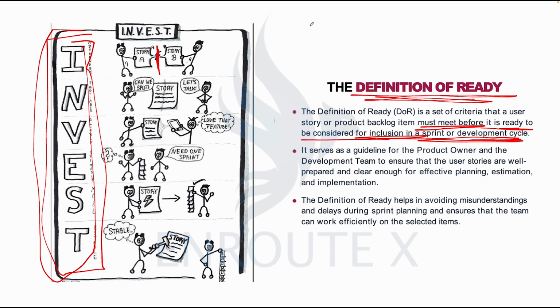When the team has no availability to work on that story, or they do not have the capacity, which is the skill set, to work on that story, that also means that story does not meet definition of ready. This is availability, mind you, and this is capacity. It's not AC standing for acceptance criteria, no, right?